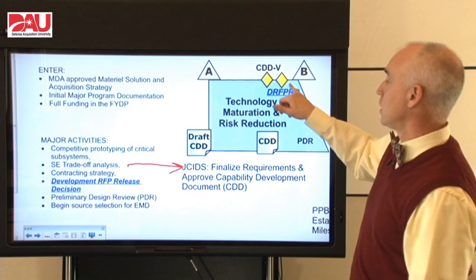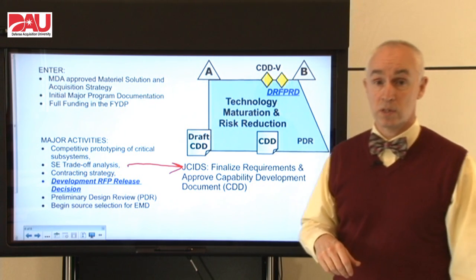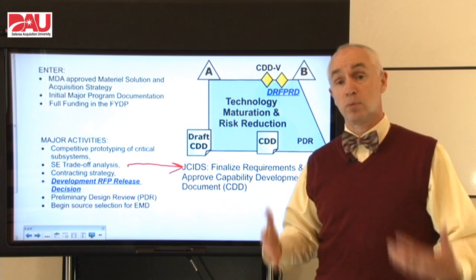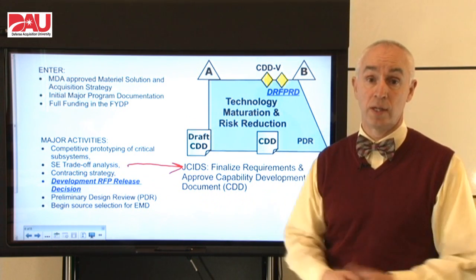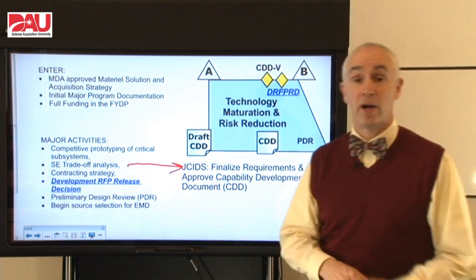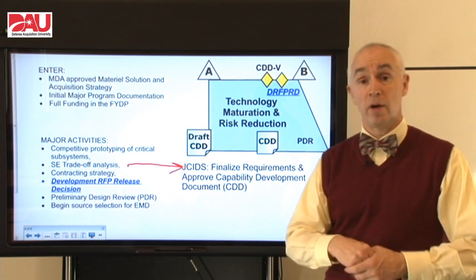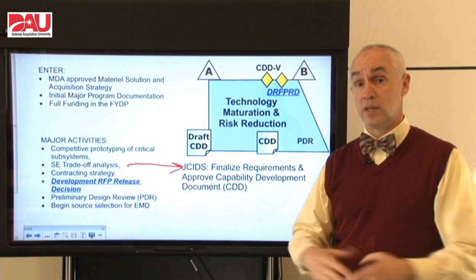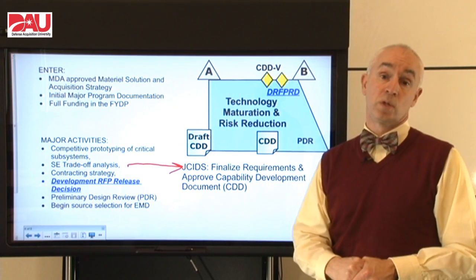Then we've got this big decision: after the CDD is validated by the user, we have a Development Request for Proposals Release Decision, or DRFPRD. That is new, and it does just what the acronym says — it gives us permission to release a request for proposals. As we're going along, we've got to put together a contracting strategy to get that permission, as well as update most of our major program documentation. This is considered by our leadership to be the key decision in the overall life cycle of the program, because once you put requirements out in writing that will go into a contract, there's not a lot you can do to make major changes without major perturbations in your program.